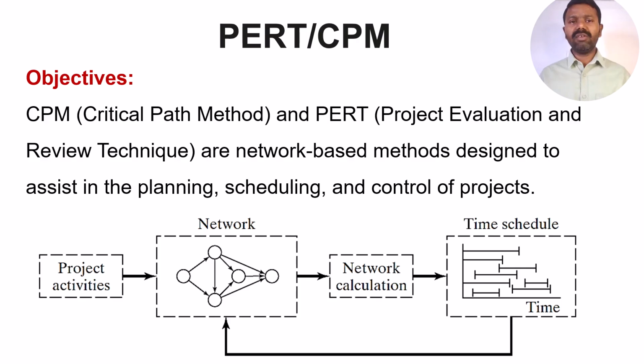Initially you will be purchasing the steel, and at that time they will start working on the steel, and again you need concrete, cement, sand, etc. All these things can be procured in parallel, and in parallel they can work on the construction of the bridge. So this way we see how many activities there are to complete the entire project, and what the dependency on each activity is.